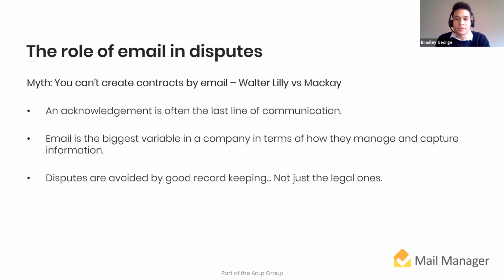So yes, onto the role of email in construction disputes. One myth in the industry is that emails are not legally binding, and that certainly isn't true, and it can often make businesses responsible for their actions. And in the case of a dispute or a litigation issue on a project, emails as a result can act like mini contracts.